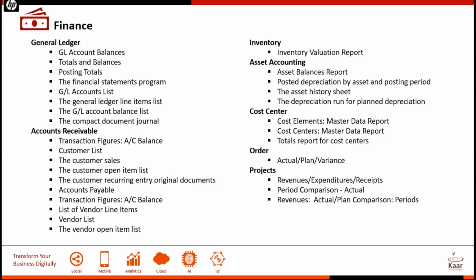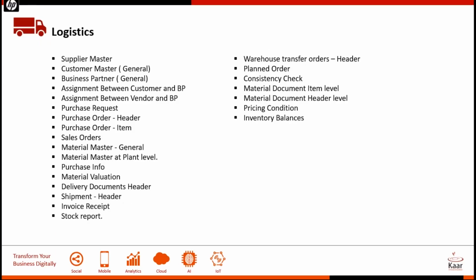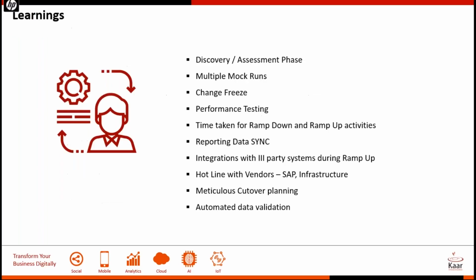And this is a sample from the logistics. So depending on the use of the customer, you will have to ensure that all the data that you have has got migrated and validated. So once the validation is done, then a smoke test, and then you release the system to the users. That kind of completes a conversion from ECC to S4.